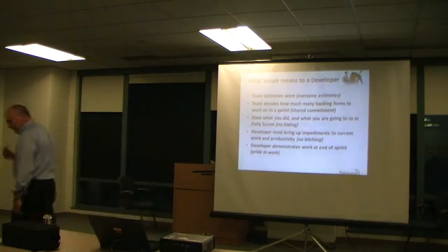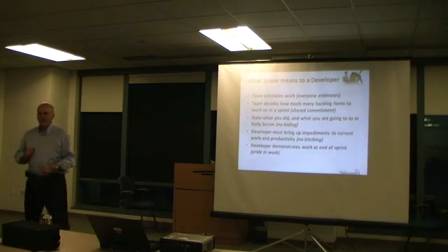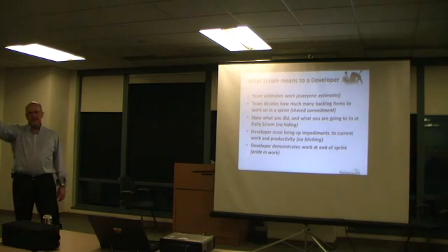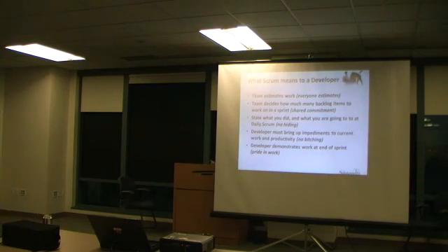Be careful about imposed commitments. Because if Tim does my estimates, and he's a really smart guy, he'll say, oh yeah, I can do that in about 2 days. That's going to take me 2 weeks. I'm a normal human being, right? I'm not the rock star guy.